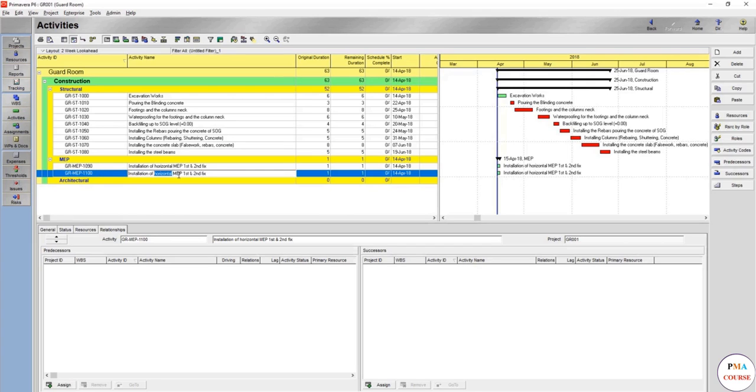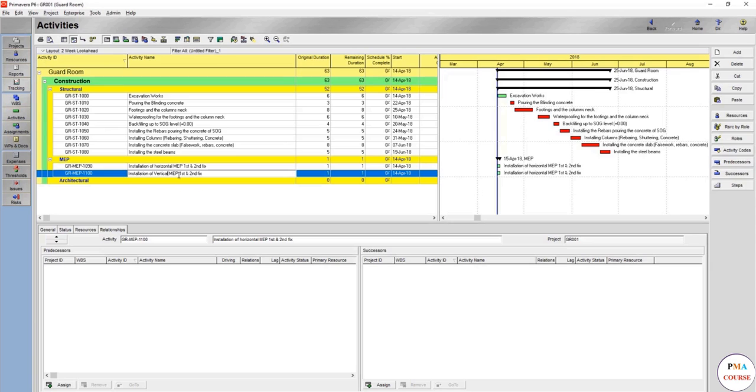So here you just copy, then here it is 1100. And here instead of the horizontal, you're going to see the vertical MEP first and second, which means risers. We don't have much risers here because it's only one room, but it means mostly like the bar supply and any low current containment, anything that goes down.